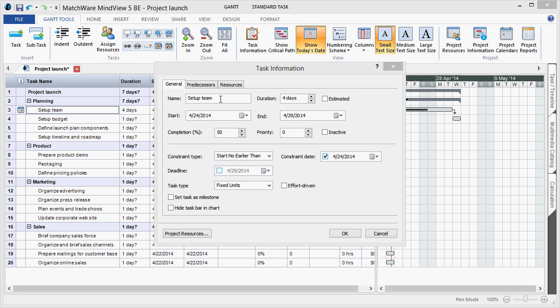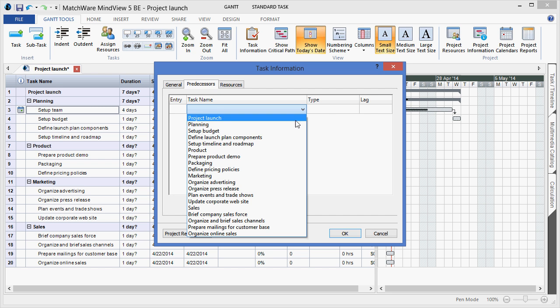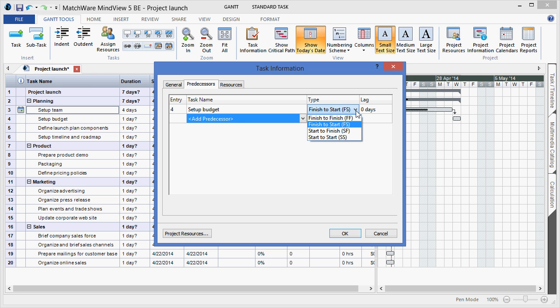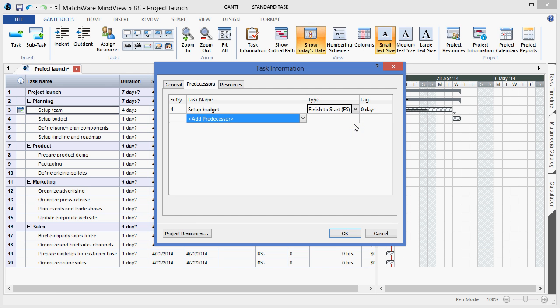Under the Predecessors tab, I can choose to select additional task items and associate various types of dependencies. By utilizing the drop-down, you can see we have the standard predecessor types, and add any corresponding lag time that I may need to apply within the listing itself.